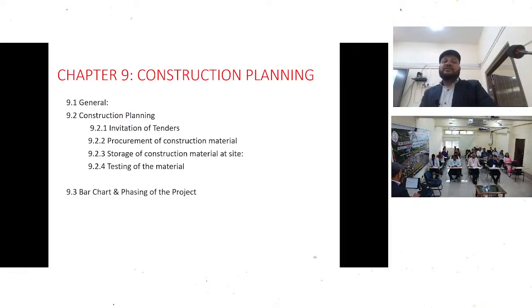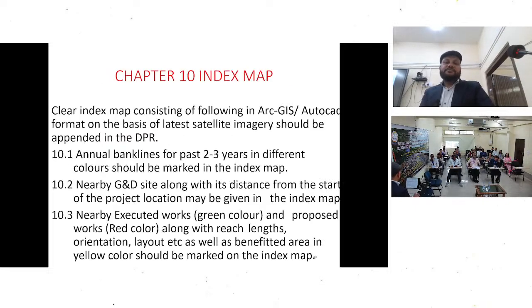Then construction planning. In general, what is the planning of construction? We have to put in the DPR the invitation of tender, procurement of construction material, storage of construction material at site, testing of material, and bar chart and phasing of the project. Everything has to be planned in the DPR only, so that the project will be successful.